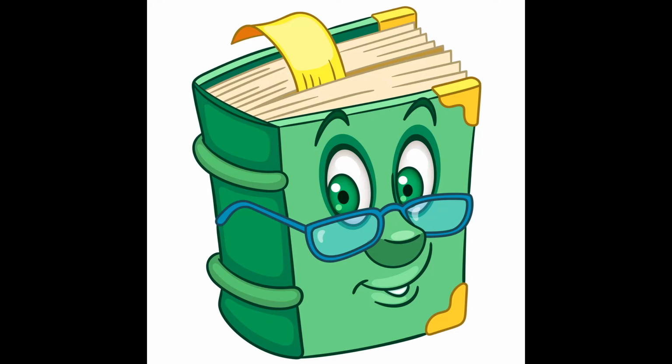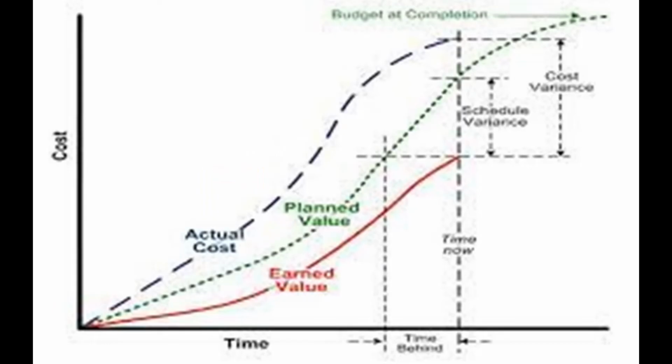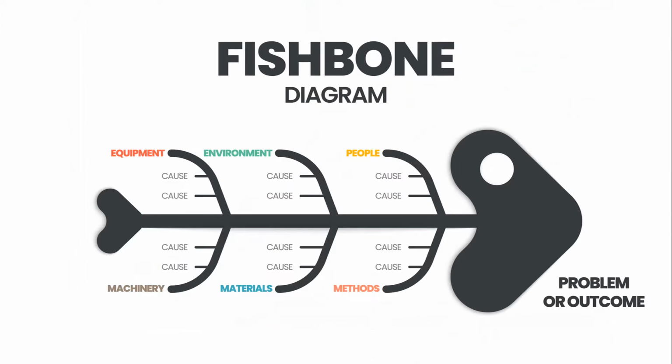Alternatives analysis is used to select the corrective actions or a combination of corrective and preventive actions to implement when a deviation occurs. Cost-benefit analysis helps to determine the best corrective action in terms of cost in case of project deviations. Earned value analysis. Earned value provides an integrated perspective on scope, schedule, and cost performance. Root cause analysis focuses on identifying the main reasons of a problem. It can be used to identify the reasons for a deviation and the areas the project manager should focus on in order to achieve the objectives of the project.